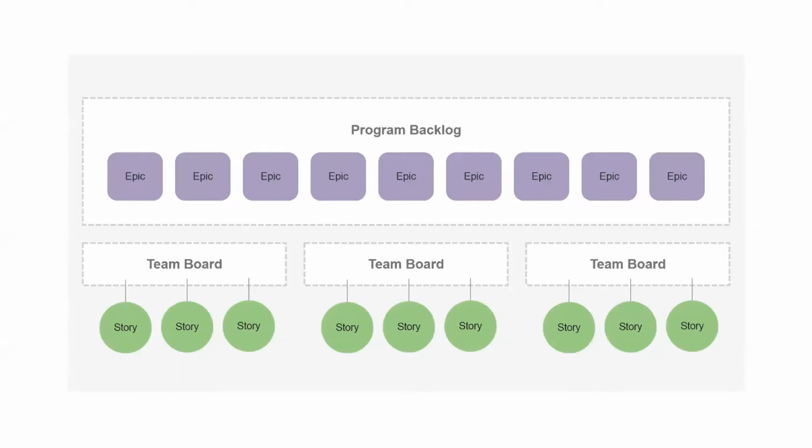All right, so you can configure SAFe with out-of-the-box Jira software configurations. Let's start with Essential SAFe. It is the foundation and the lowest level. Its focus is on feature development by multiple agile development teams, which make up a single agile release train, or ART. There are multiple ways to configure Essential SAFe in Jira, and the visual shows only one of these ways. It uses a single Jira project for an agile release train, which houses all of the epics and stories worked on by the teams in the ART.